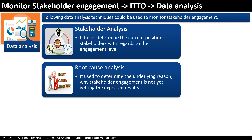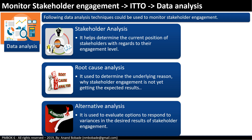Root cause analysis is a technique used to determine the underlying reason why stakeholder engagement is not getting the expected results. Once you have analyzed the root cause and come up with a few options on how to respond to the variance between the current position and the desired engagement level, alternative analysis is used to evaluate those options.